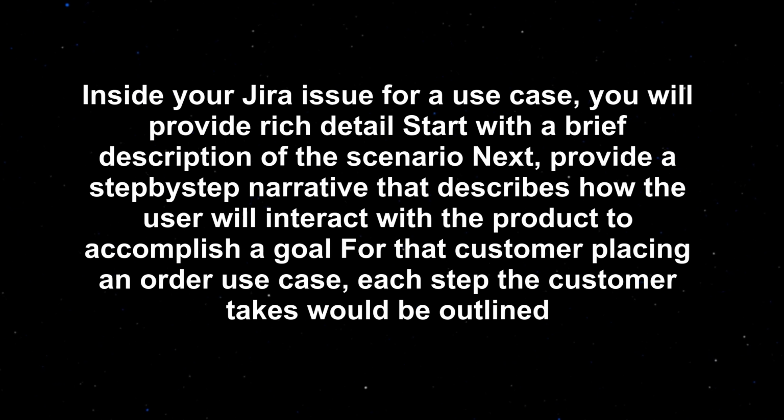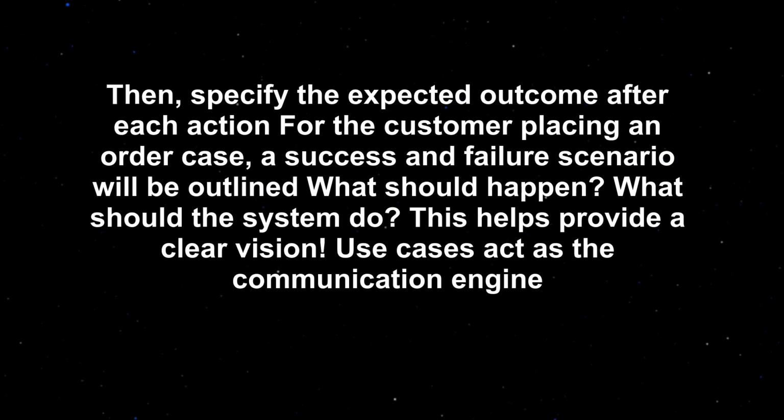Inside your Jira issue for a use case, you will provide rich details. Start with a brief description of the scenario. Next, provide a step-by-step narrative that describes how the user will interact with the product to accomplish a goal for that customer placing an order use case. Each step the customer takes would be outlined. Then, specify the expected outcome.